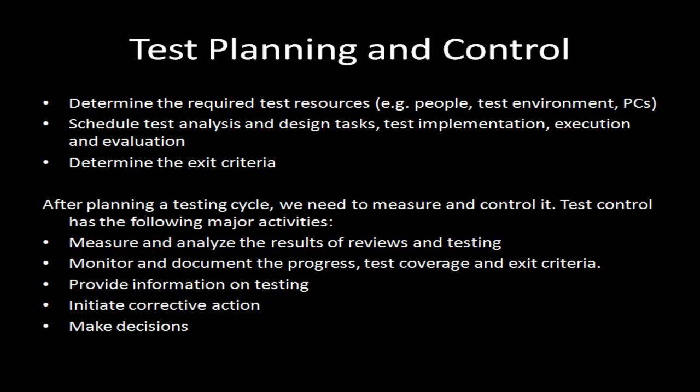provide information on testing. We should expect to make regular and exceptional reports to the project manager, project sponsor, customer, and other key stakeholders to help them make informed decisions about project status. We should also use the information we have to analyze the testing itself. Initiate corrective actions. For example, tighten exit criteria for defects fixed, ask for more effort to be put into debugging, or prioritize defects for fixing test blockers.